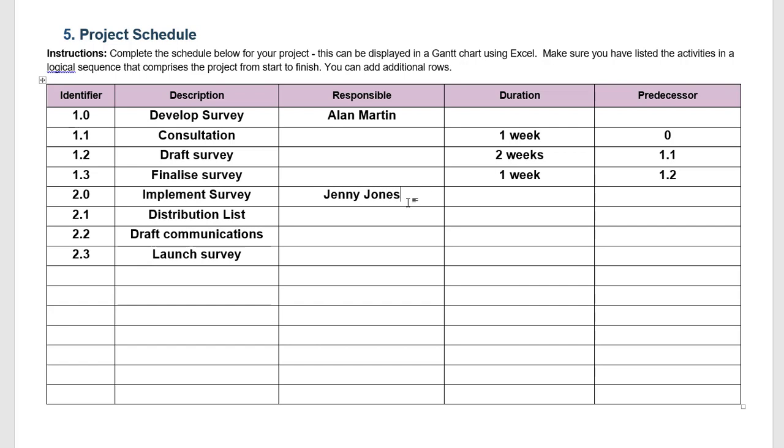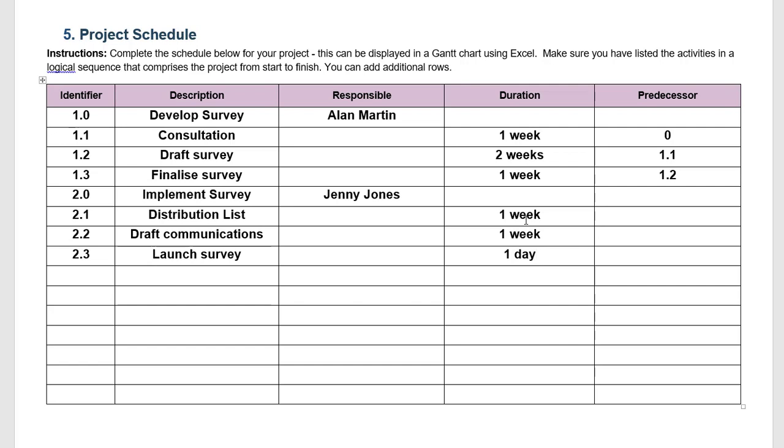So again we need to figure out the timeframes. The distribution list, let's say that takes one week in order to cleanse the distribution list, make sure it's up to date for all employees so that they'll receive the survey correctly. We'll draft the communications, that's also going to take us one week as some stakeholders might need to review and give feedback. The launch of the survey will really only take one day as it's ensuring that the survey is distributed to everyone using the distribution list we've already organized.